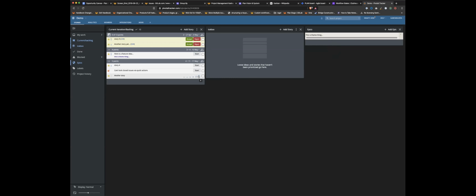So as a stakeholder looking at this, I know I have 2 issues that I need to go review because I'm the one who's responsible for doing that on the team. And so it's easy to see that. It's easy to see, when you have a long list of things, who's working on what's in flight. And it basically auto schedules your iteration. So I don't have to worry about thinking about how much we can fit into a sprint. It just will say, this is what you can do based on what you've done in the past. And if you happen to get done with all your stuff, great. You can pull new things in. It's not keeping you from doing that, but it just simplified one view, never have to go anywhere else,